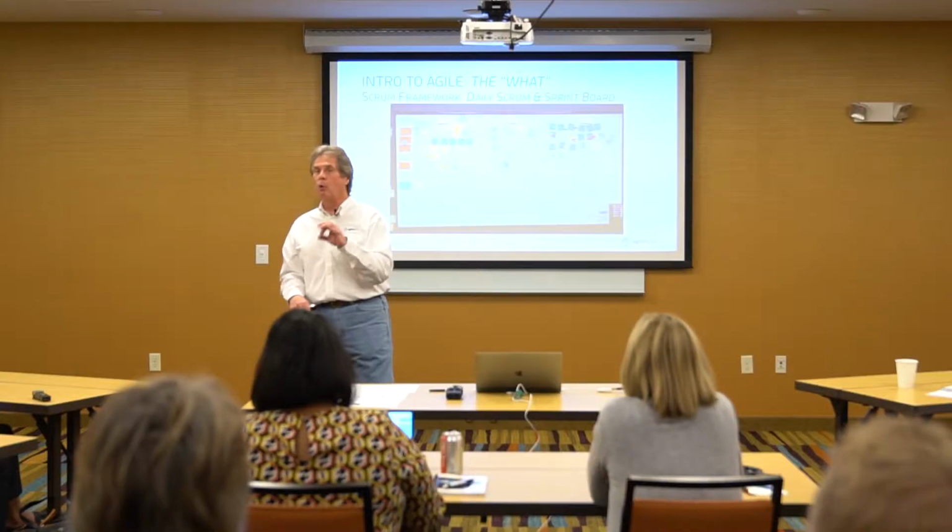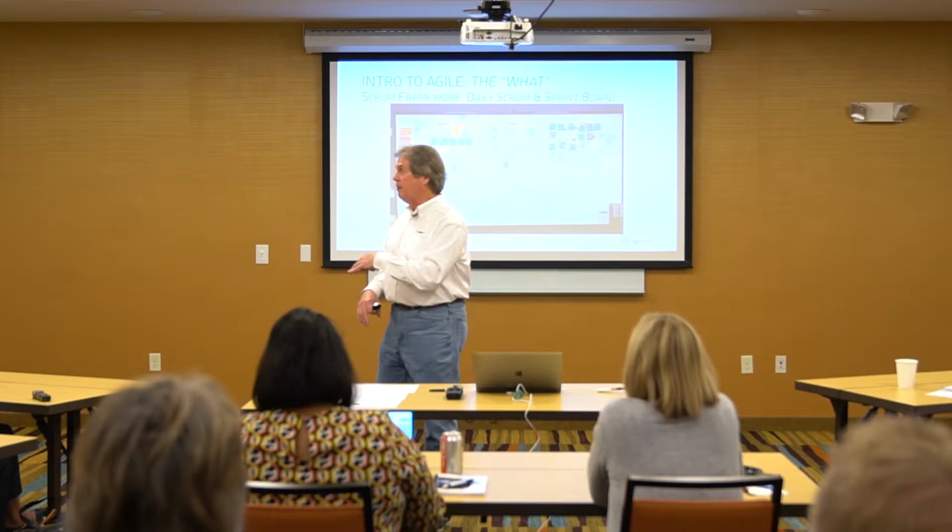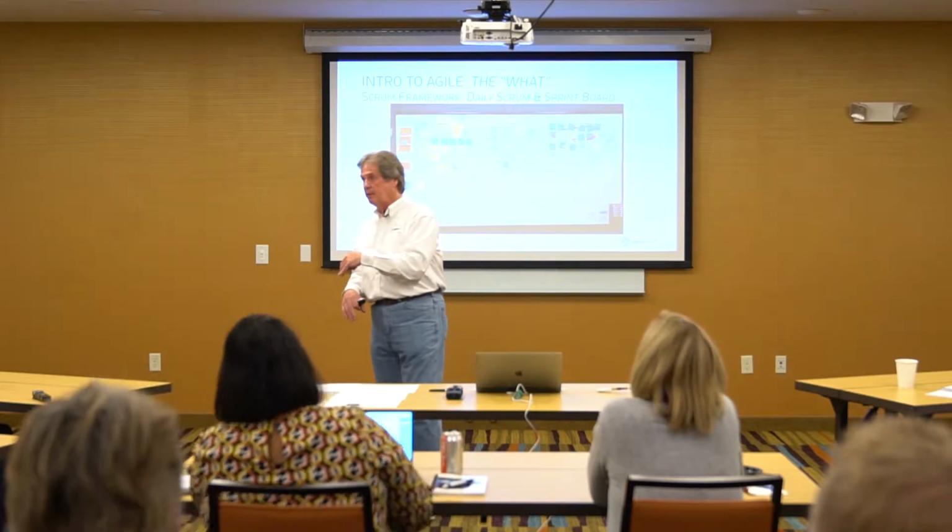Here's another big change. If you've got a product that is so sophisticated, has multiple Scrum teams because you've broken it down by capability or feature, the product architecture or the technical architecture, whichever, is the thing that should drive the Scrum team architecture. If you refactor that product or technical architecture, you need to refactor the Scrum team architecture.